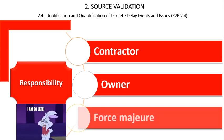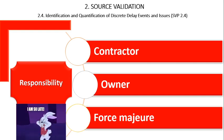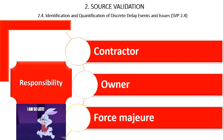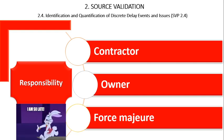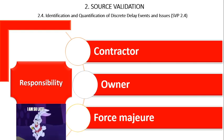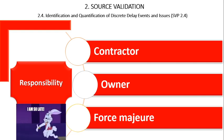Force majeure delay is any delay event caused by something or someone other than the owner, including its agents, or the contractor or its agents, or the risk of which has not been assigned solely to the owner or the contractor by contract language and/or local industry custom and practice. Examples of force majeure delays include, but are not limited to: delays caused by acts of God, inclement weather, acts of war, extraordinary economic disruptions, strikes, and other events not foreseeable at the time of contract. Many contracts specifically define force majeure events. Although strictly not a force majeure event, delays caused by parties external to the contract may also be classified under this category, if there are no contractual risk assignments to the contractor or the owner for such delays.